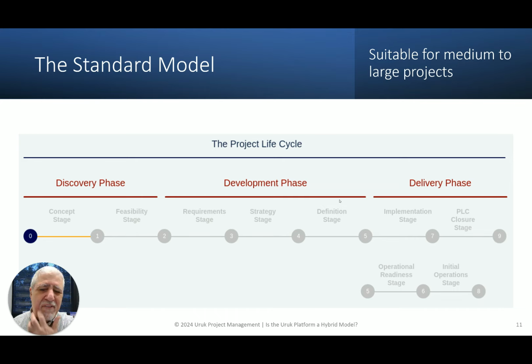And then every phase has two or more stages, again, for the medium to large project. And then there are different stages. Now the names we use here are the generic CAMP model names. However, obviously, remember when we talk about tailoring, everything is tailored. That means the number of stages, the number of gates, the number of phases, their names, the name of the gate, what goes into the output of every stage, what happens at every stage gate, all of that is tailored, right? So what this gives you here is just a generic way of visualizing.